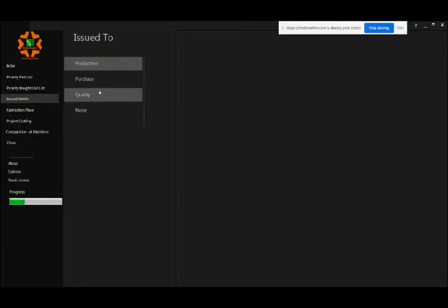Okay, there's another option which says issued to none. Again, when we are making a machine, we do release drawings partially, right? We do not release all the drawings together. So if you want to check which drawings we haven't issued yet, which we haven't released yet, you can just click and create a report which will give you the details of items which are not released yet.